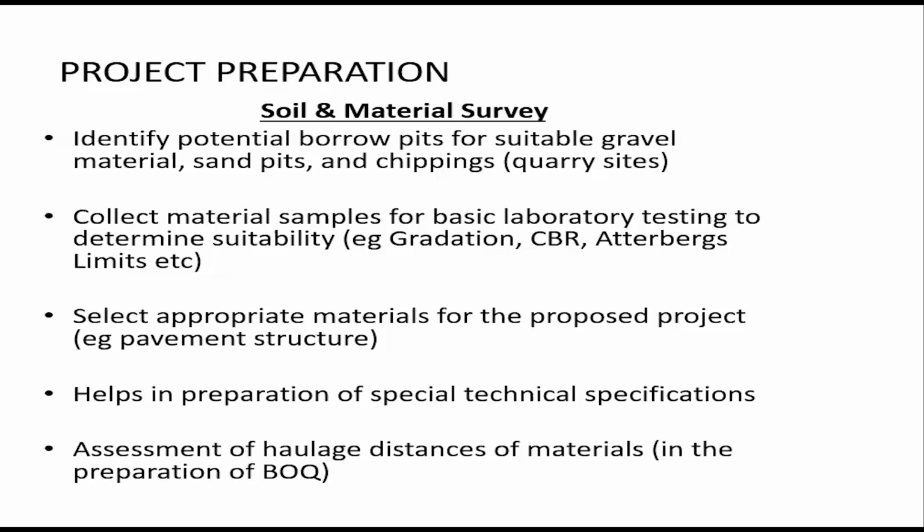For example, pavement structure. Then it helps in preparation of special technical specifications for the project. And each project has its special technical specification. Then assessment of haulage distances of materials, which is very important because the quantity surveyors who are preparing the BOQ need to know the haulage distances and then be able to cost it very well.